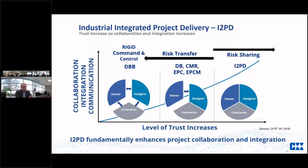Design-bid-build intentionally separates the owner, designer, and contractor — it's a pushing of risk versus a sharing of risk. EPC or design-build puts the contractors and designers together, but owners are still segregated from those two partners. Whereas in I2PD, everybody's in the sandbox together — everybody's playing together and everybody is sharing that risk. This level of trust won't happen right out of the gate, but as the parties begin to protect one another and have one another's back, you'll witness that trust ratcheting up over time.